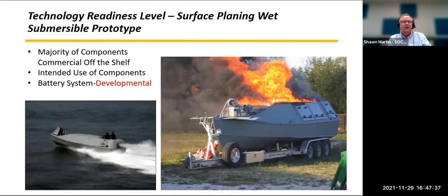What wasn't was the battery system, and we were trying to mature it. So we identified early on that it was a lower TRL, and we understood that it was a risk. So what we did is we placed in the boat, for some relevant testing, very well understood car battery technology. It didn't have much energy density, so it couldn't go but maybe a nautical mile subsurface, but it was safe. We understood it. The risks were minimized.